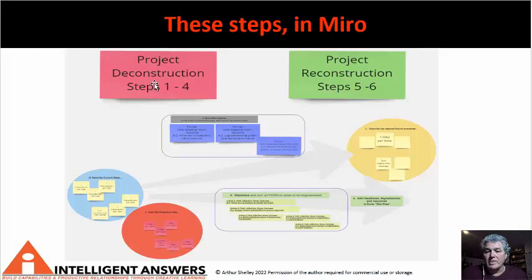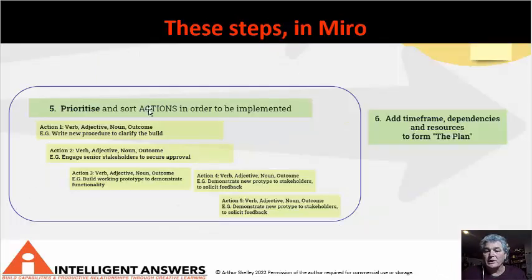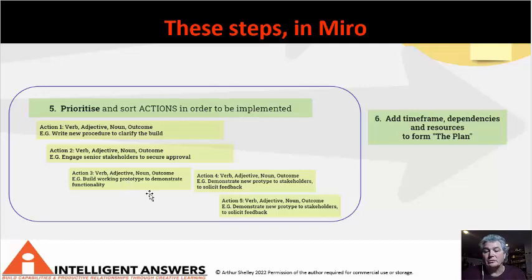So what that looks like in Miro — we did the last video around the deconstruction, we're now talking about steps five and six. We prioritize and sort the actions in order to be implemented. We take these series of actions, we say when they're going to happen, how, and the timing — what can happen in parallel and what needs to happen in series, that is one after the other. You can see it starts to look like a Gantt chart already. We then take those actions and build them into a time frame that actually makes sense and can be delivered with the resources that you've got. That is the plan which gets proposed to the stakeholders in order to secure support to take the next steps.